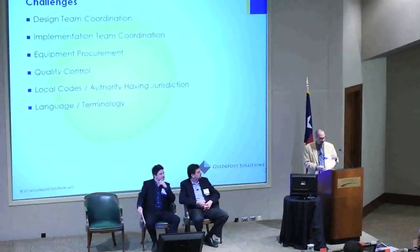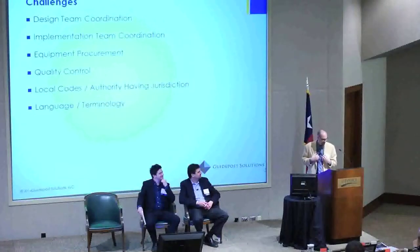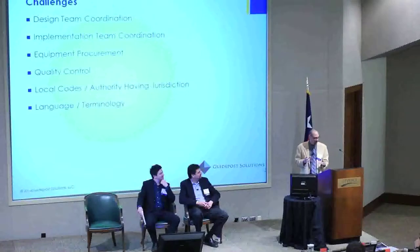Our second challenge is implementation team coordination. Understanding your milestone dates is critical. There's nothing worse than going to a site to commission tests to find out that that country is on holiday. I have had the personal privilege of figuring that out myself. So understand the milestone dates and how that relates to that particular country.